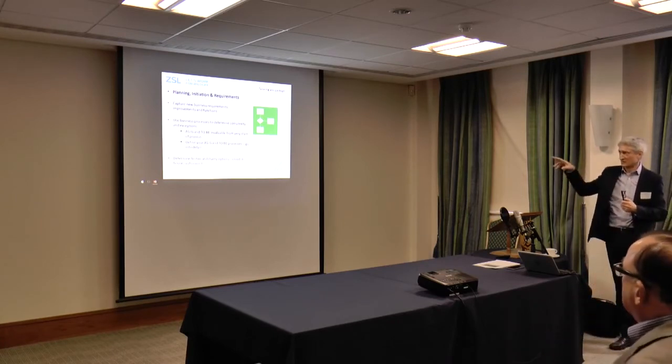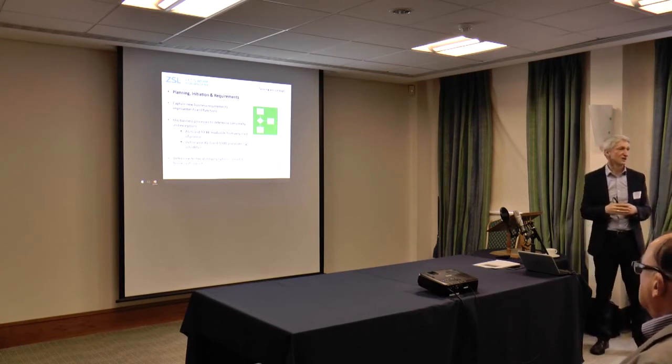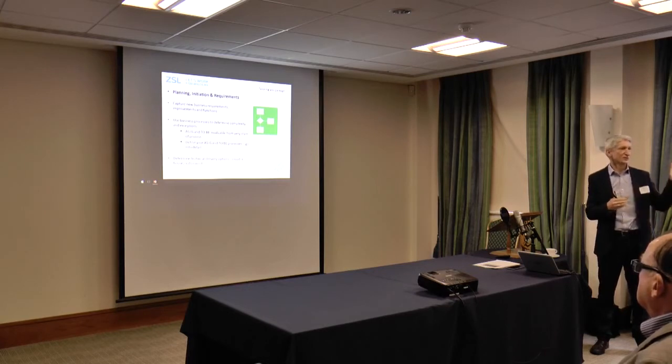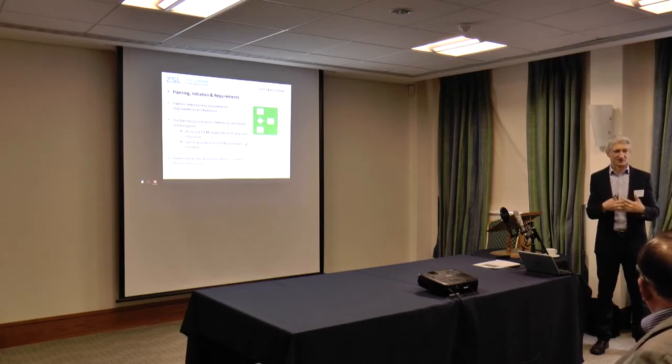And then the other thing, and I touched on it earlier, is technical delivery options: cloud, in-house, outsourced. At the moment, any vendor will come along and say they can run it in the cloud for you. Lovely, you don't need to worry about it, or you can put it on your servers. There's a whole series of risks and opportunities there. I think just from observation, the one that gives you more control is probably doing it in-house if you've got the staff and resources.